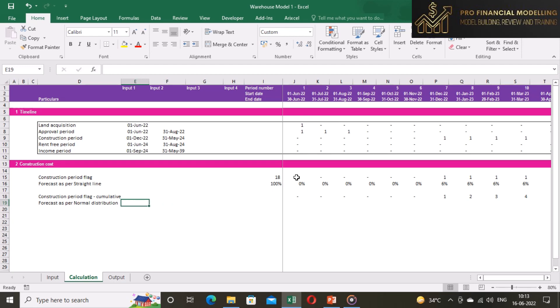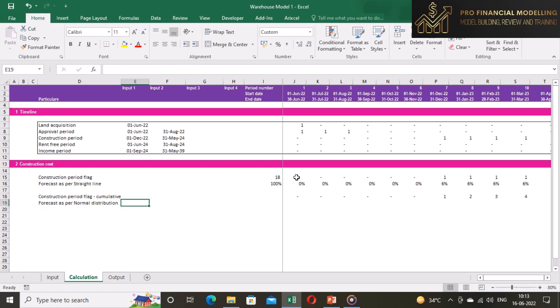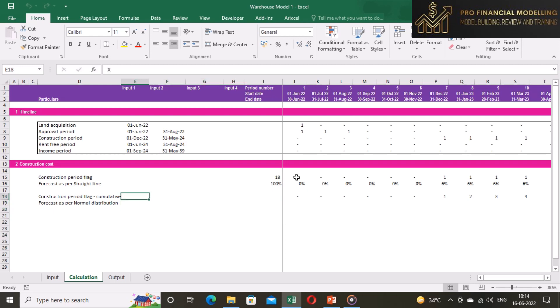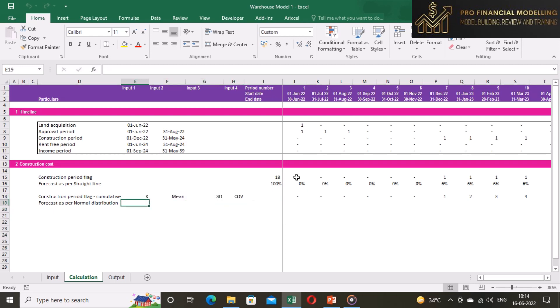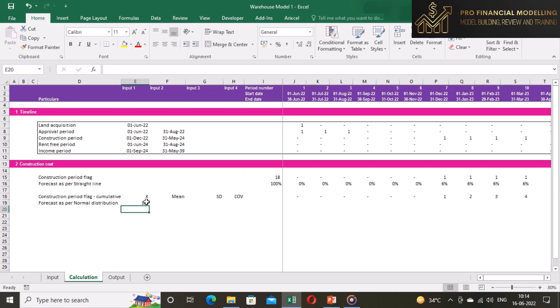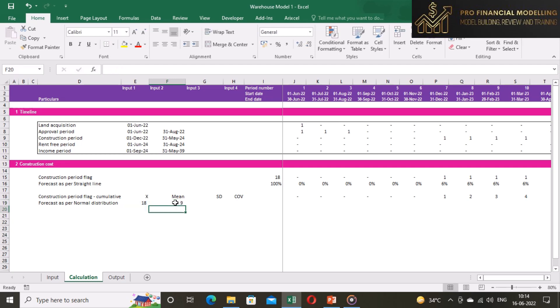Now we need to insert our inputs for normal distribution curve. The normal distribution requires three inputs which are x, mean, and standard deviation. The x shows the count of months. We can link this input with sum of construction period flag. Second input is mean of x counts which can be arrived by dividing it by two.